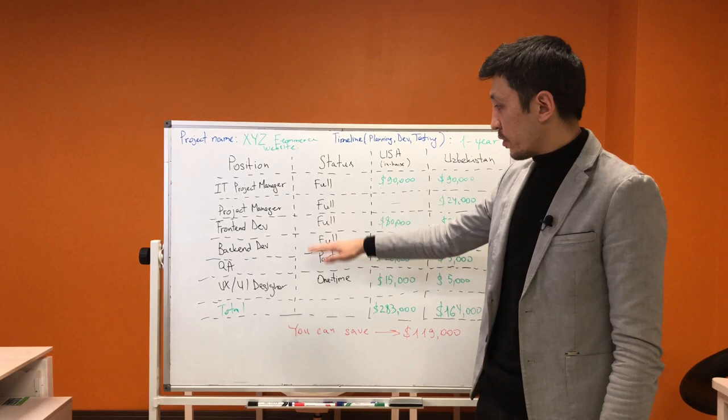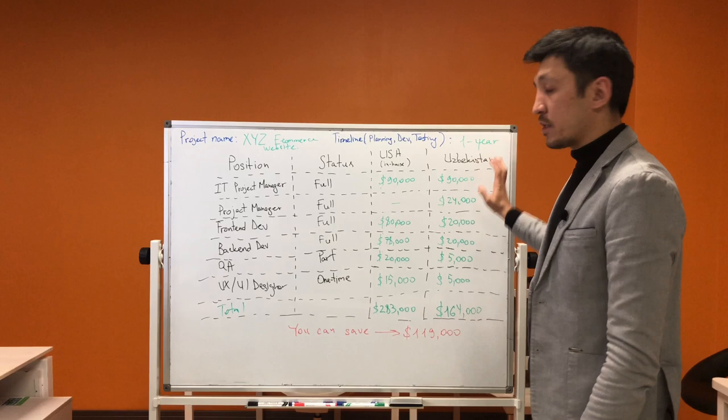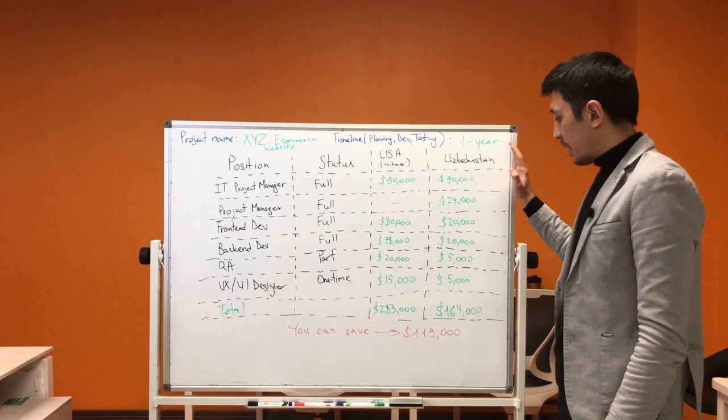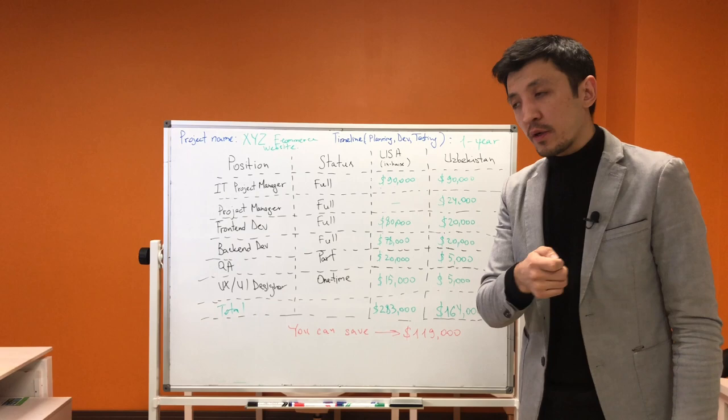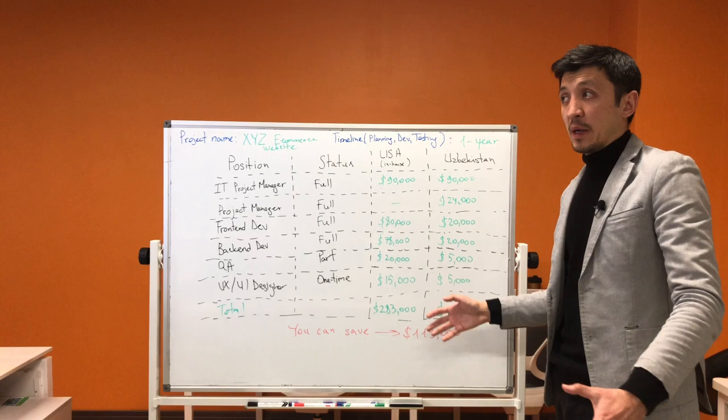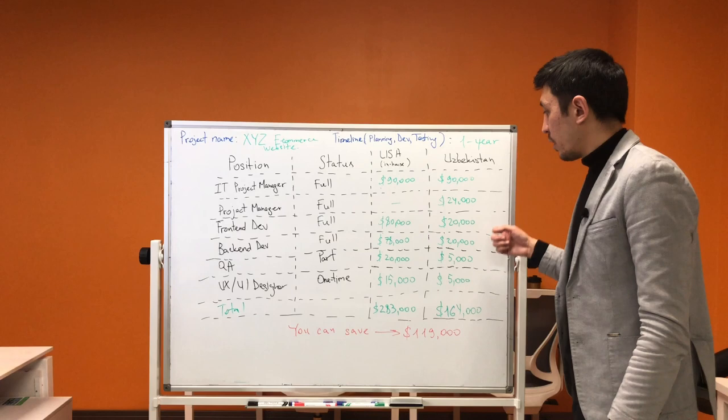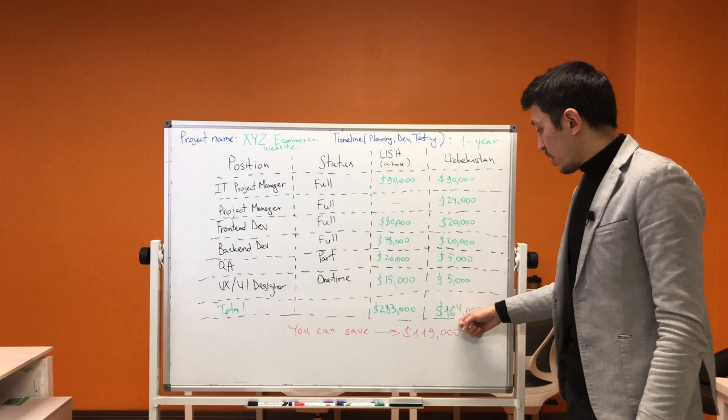These are example numbers which are up to date as of today, February 2023. You can hire people—these are yearly salaries, the yearly cost for each position. For one year, it will cost you $164,000 including your IT project manager.